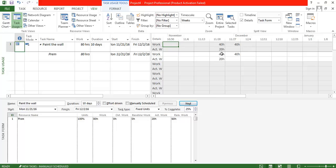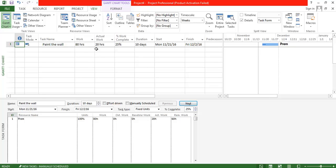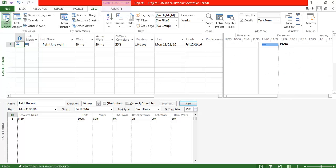This is one way of entering actual work — when you enter the actual work completed in the Gantt chart view, it assumes the remaining work is also available for the same week. It doesn't recognize that if 20 hours of work is given for this week, the remaining 20 hours should move to the next week. It's not possible to identify which week you're referring to when giving actual work completion at the task level.